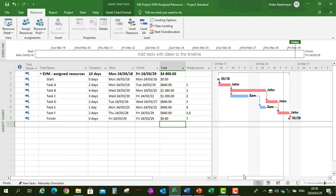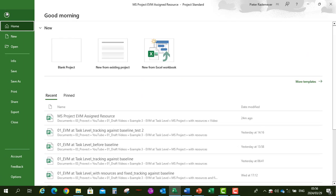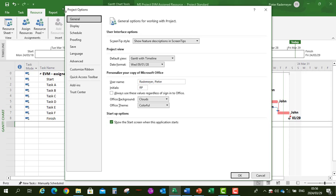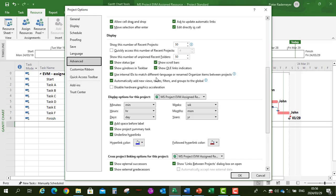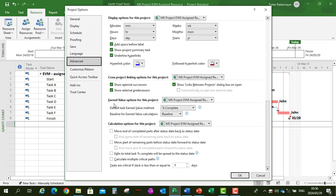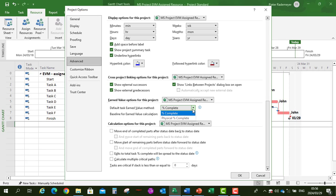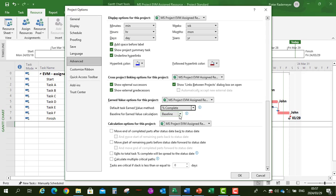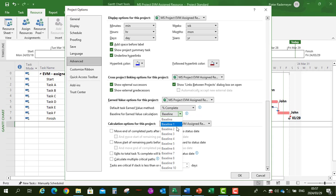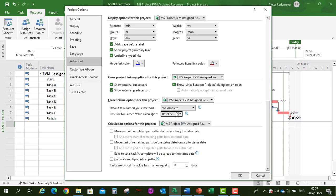Next we're going to set some earned value options for the project. Click on File, Options, Advanced, then scroll down to the earned value options. The file selected is the one we are working in. The default task earned value method is set to percentage complete — you can also select physical percentage complete. Then set the baseline for earned value calculations to Baseline, which we'll create now. Click OK.